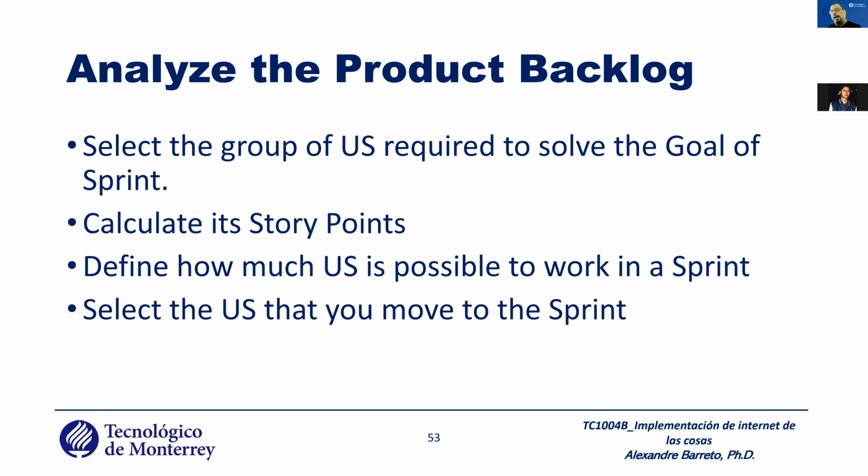Okay. After you do it, you need to analyze the project backlog. You define what the goal is. You need to analyze the project backlog. How do you analyze? First, you select the group of user stories required to solve the sprint goal. Okay. Calculate its story points.